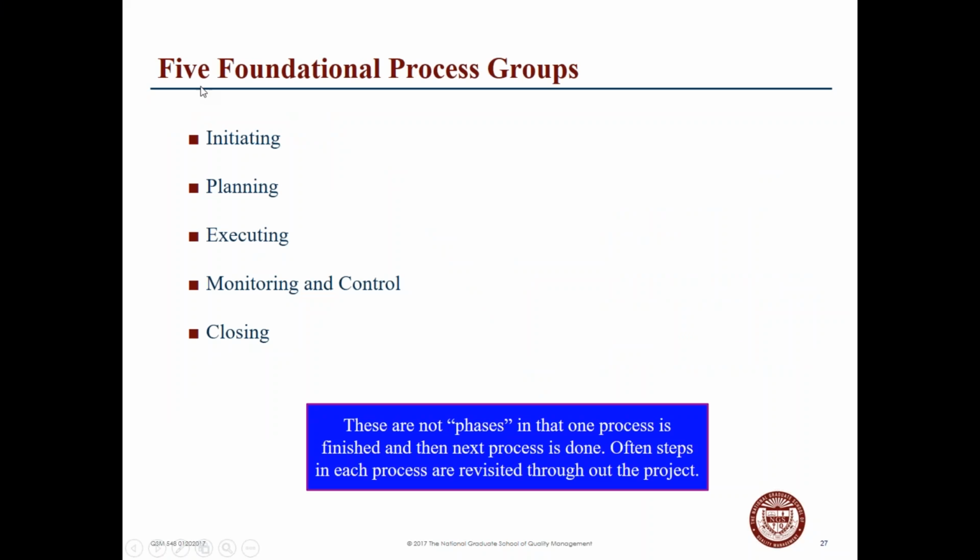So the next focus point is in terms of what we call the processes, the foundational processes. These aren't phases. They're not, you stop one, you start one, and you move on. A lot of times, the initiating, planning, executing, monitoring, control, and closing may happen more than once and may need to be revisited more than once throughout the project. And I'll show you what I mean by that in a second.